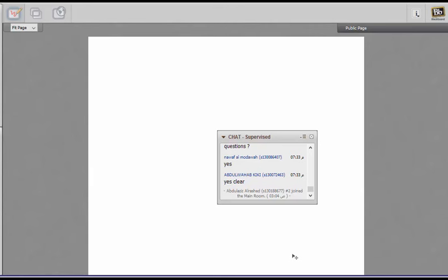So if you have to make a product-based WBS, extract all the nouns and then arrange those nouns in the form of hierarchy that a WBS is. At the top, it will be the project. After that, the nouns which are the major components. After that, the nouns which are major tasks or divisions. And in this way, you will create a product-based WBS. If you are asked to make a process-based or phase-based WBS, then extract all the verbs.